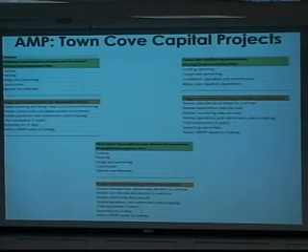And that's the whole point of adaptive management. You put out your best understanding of, and maybe a vision for where you'd like to be. You know, maybe we'd like to be testing floating wetlands and shellfish in a year from this summer. Maybe we drive to that and then suddenly we realize there's no way we can get the permits in place. So it's going to have to slip.